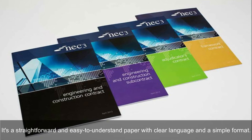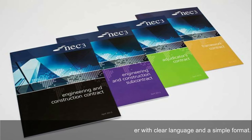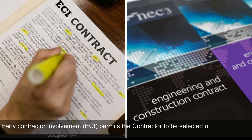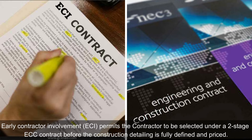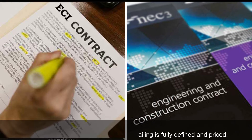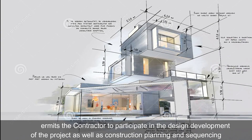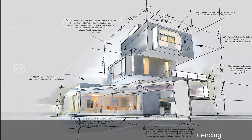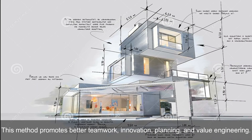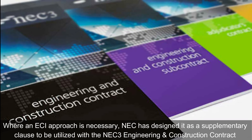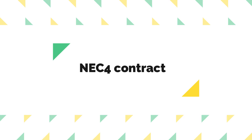It may be utilized in a wide variety of commercial scenarios for a range of jobs and settings. It is a straightforward and easy-to-understand document with clear language and a simple format. Regarding the difference between NEC and ECI: ECI permits the contractor to be selected under a two-stage ECC contract before construction detailing is fully defined and priced, allowing the contractor to participate in design development, construction planning, and sequencing. Where an ECI approach is necessary, NEC has designed it as a supplementary clause to be used with the NEC 3 Engineering and Construction Contract.